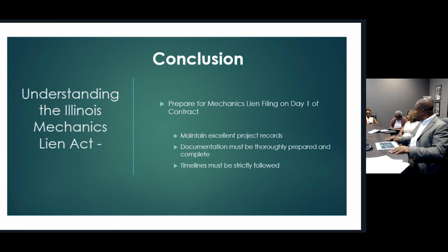And is that PIN number something that's readily available? Yes. Please forgive me, because I'm so used to going to the resource to finding what I need. You can go through a couple of different resources to get that done. You can go through the assessor's office. Matter of fact, I want to say that the assessor's office has a nice little tool. You can plug in what you believe is the address, and it can lead you to the PIN. And then if you've got the PIN, now you can go to the recorder's office and get the legal description. So, there's not like a one-stop shop, but you can get that information online without having to go out of your house to get it.